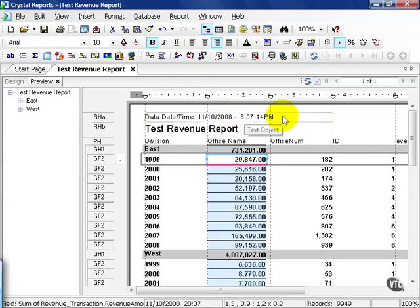Notice I have my data date and data time. This helps me realize when the report was run and serve as a point of reference. Obviously, if you run a report halfway through the month and then at the end of the month, there will probably be some differences, unless, of course, we're talking historical data. But it's always good to have the data date and data time to let you know if something happened, you can pinpoint it and explain any differences.